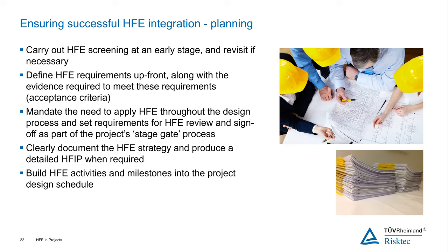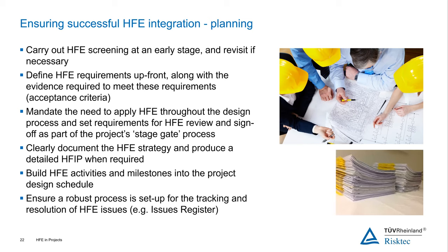Clearly document the HFE strategy and produce a detailed plan when required, and build those HFE activities and milestones into the project design schedule. And ensure a robust process is set up for tracking and resolution of HFE issues that I mentioned before. So potentially use some sort of issues register, either as part of the project register or set up a separate register for human factors.